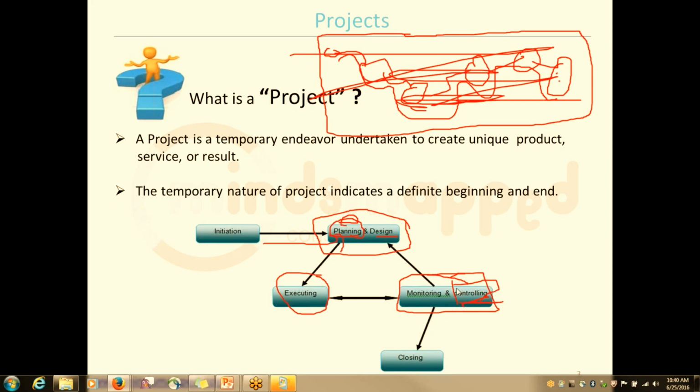Okay. So we were talking about the controlling. As Amazon said, I want to have the fusion, in that case I would be creating a new subcategory on the left hand side. But I would tell Amazon that I would be charging for it. Charging will again depend on so many conditions. Charging can depend on the number of resources required. So for this new change, I need 5 resources, in which one would be the lead, one would be the BA, one would be the testing team. So I would be charging it from Amazon.